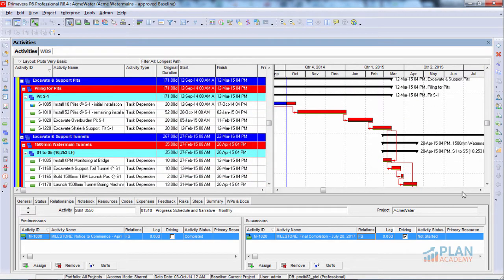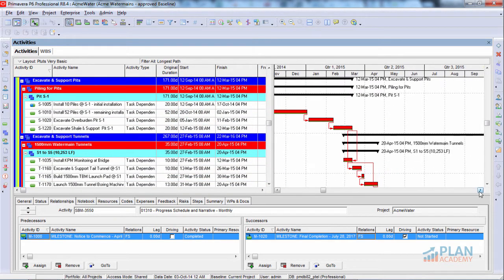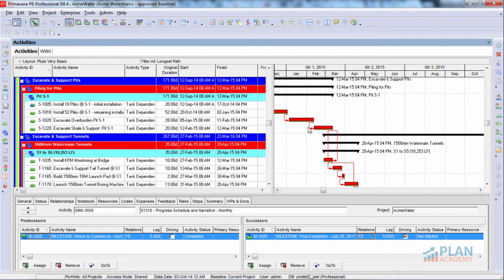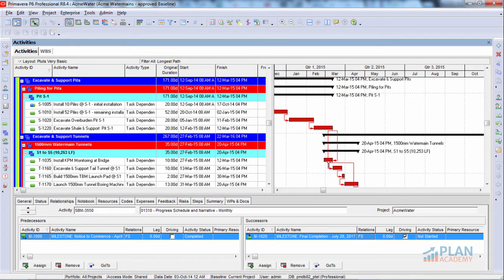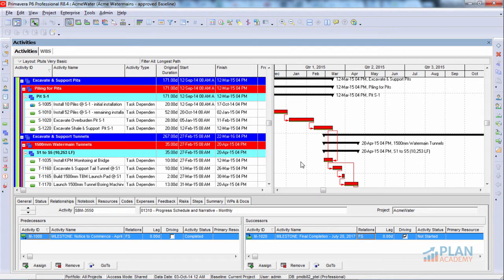Now, let's come down here and have a look at this area of the project right here. You can also see that we have some overlapping activities. And once again, we want in our longest path to show the longest path of continuous activities with no overlapping or delays between them. So what is happening here? Why do we have overlapping activities? And I can see that there's a finish to finish relationship here. So again, we don't believe that these results should be showing up in the filter. So how do we get a true longest path out of Primavera?